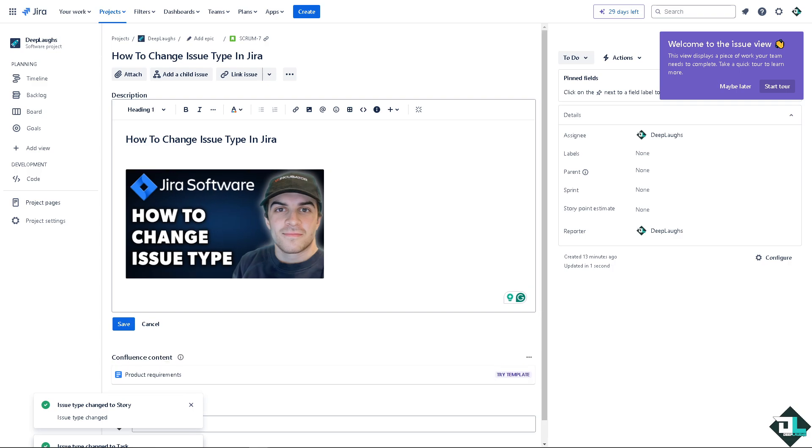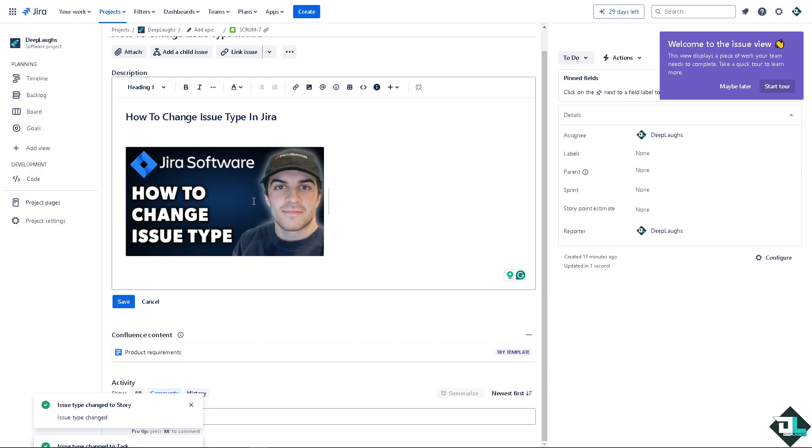All right, now different issue types may have different field configurations, so I need you to ensure that any required fields for the new issue type are properly filled out. Because changing the issue type may affect the issue's workflow and status transitions, so review the workflow associated with the new issue type to ensure it aligns with your needs. Thank you so much for watching. We will see you again in the next video.